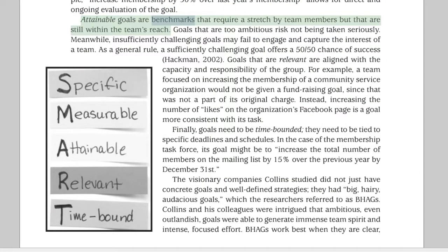Attainable goals are benchmarks that require a stretch by team members but that are still within the team's reach. Goals that are too ambitious risk not being taken seriously. Meanwhile, insufficiently challenging goals may fail to engage and capture the interest of a team. As a general rule, a sufficiently challenging goal offers a 50-50 chance of success (Hackman, 2002). Goals that are relevant are aligned with the capacity and responsibility of the group.